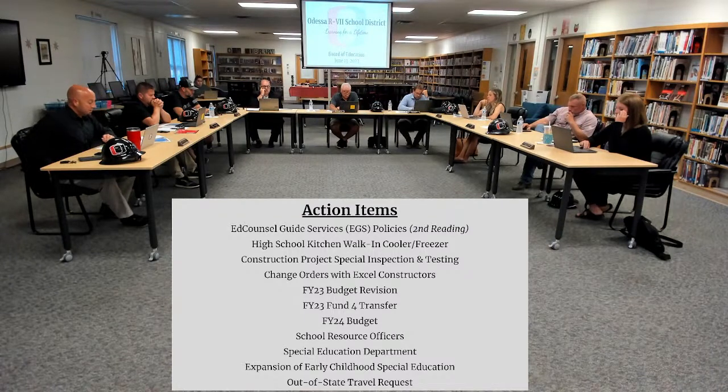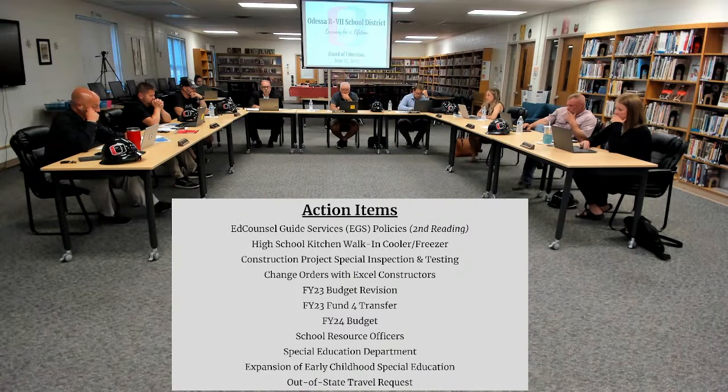$5,434. Change order 8 was to relocate a water line on our property behind the child care center due to the grading for the new bus loop. That water line will no longer be deep enough like it was before, so we need to move that, as well as phone lines and some other utilities in that same area that need to be lowered because of the new drive. So that's an additional $19,544.